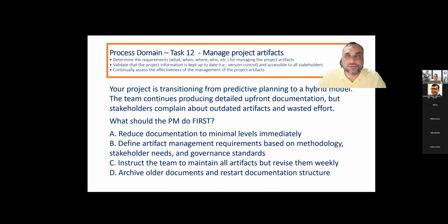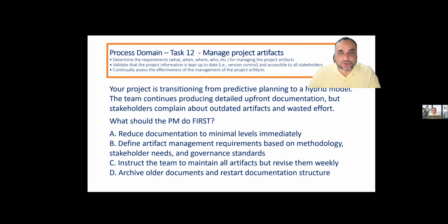So during the project, we have the lesson learned register. And after the project, once the project is closed, we have to place those files in the lesson learned repository. Lesson learned repository is available in OPA. And once it's available in OPA, it has to be in the form of communication credentials so that anyone can collect the data, but only if they are authorized, not for everything.